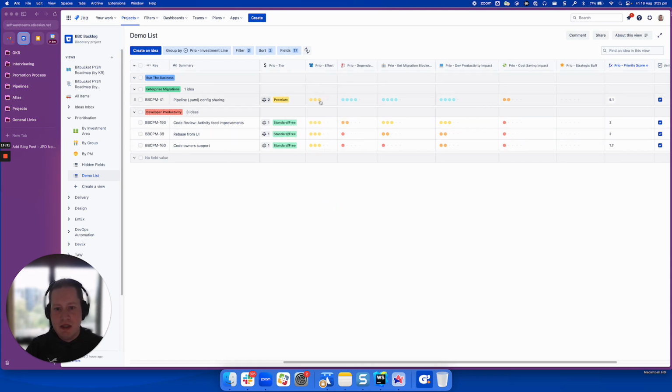And that makes it really easy for people to pick the score they want to give, because it's not subjective, like, I think this is a 5, I think this is a 3, and realistically you're both thinking the same thing, but for me a 3 is one thing and for you a 5 is the same thing. Up here we're saying no, a 3 is months, a 5 is years, a 1 is weeks. And that lets everyone operate from the same scale when they're giving these scores. And that's really important when you're doing this kind of exercise. Everyone has to be giving the same numbers when they're thinking of the same things, otherwise the scores end up being completely subjective.